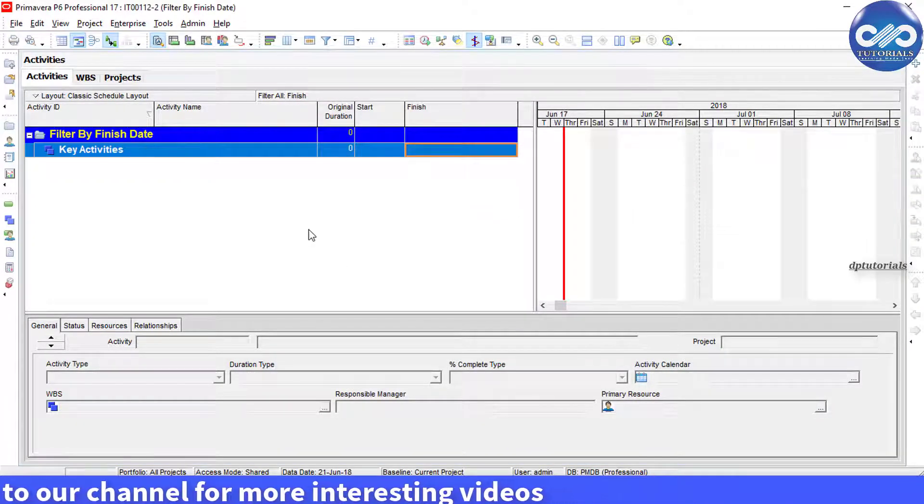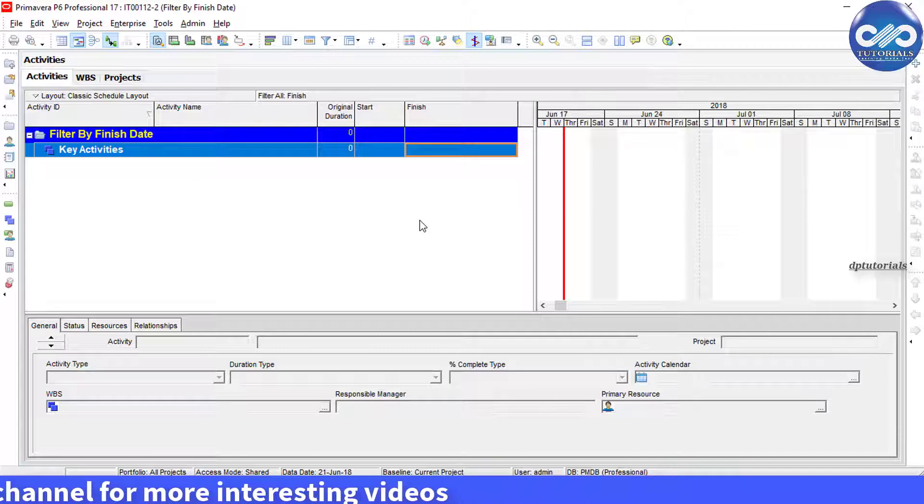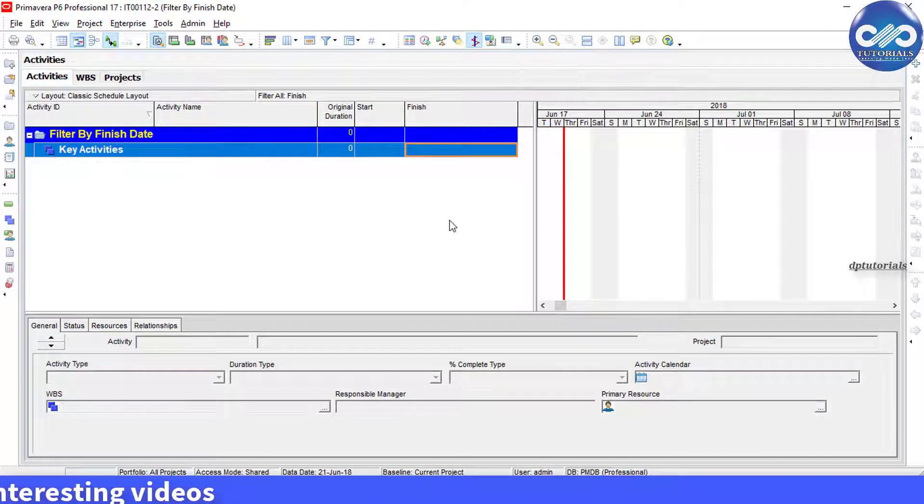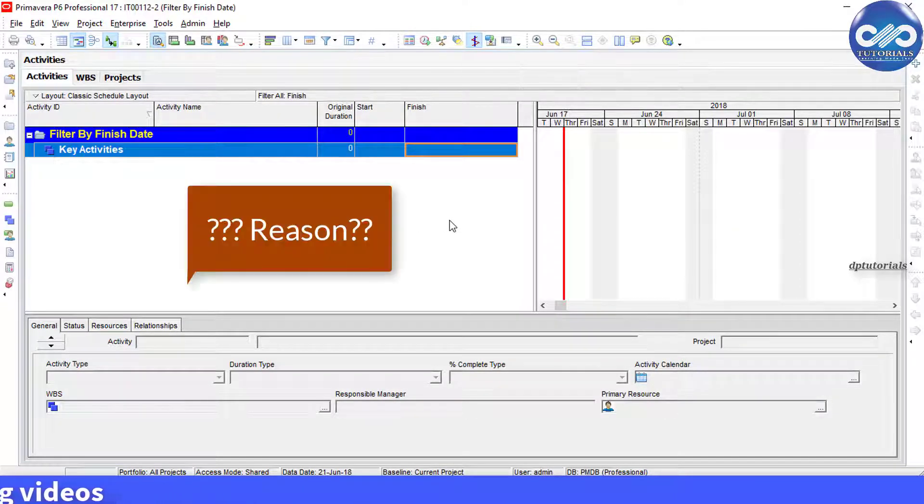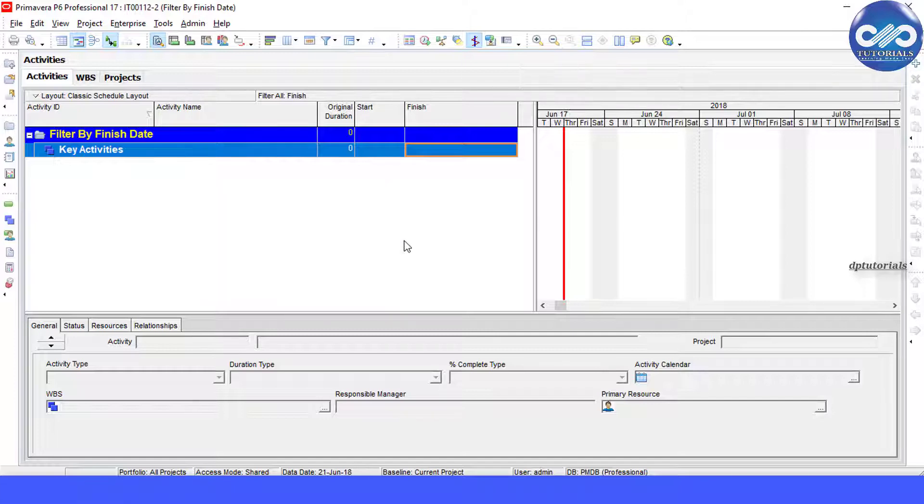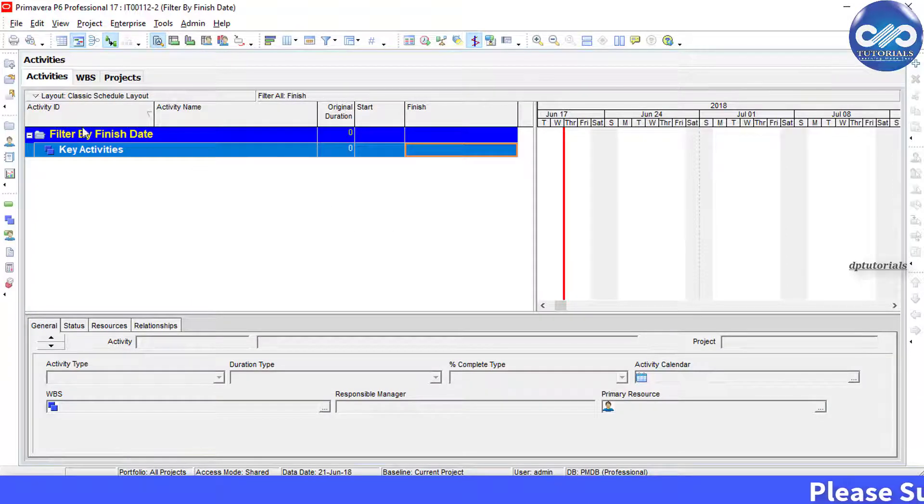You will notice that the screen goes blank without showing any activity. But why does this happen? Let us know the solution. Now you need to show the time of activity by going to the menu bar.